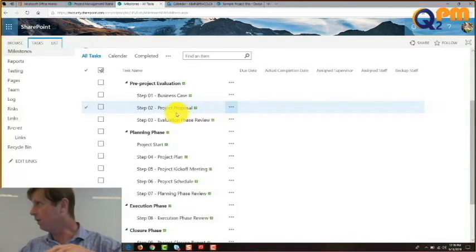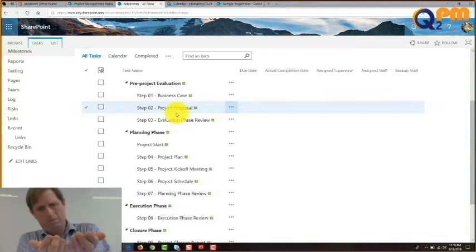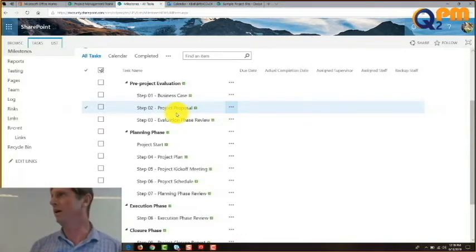Do a portion of it, or what if the Oingo Boingo simply says, oh, we don't need you guys, we'll do it all ourselves? We're not going to run it through this methodology, we're just going to wing it. Wing it basically means, we call that in our organization an initiative. So it comes in, you look at it, and you go, is it a project? Are we going to do it now? It's not really a project, let's just give it to this supervisor over here, and you can take care of this with your team, however you see fit.